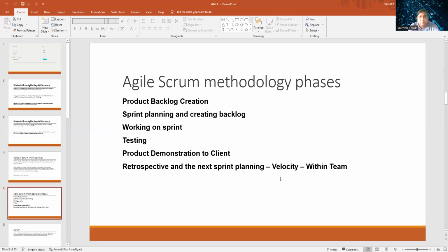Let's say product backlog 1 is, I want to get the access of the entire MS Azure space, including VM, including data lake, including everything. Okay, what are the subscriptions I need? Everything you have to take. That is product backlog 1. You have to take that access first. So once you get the access in that sprint, that product backlog will be finished. Then the second backlog will come. What is the other backlog? After getting the access, you have to connect to the data sources. That will become the second product backlog. Nothing but dividing your work into small pieces. That is called product backlog.